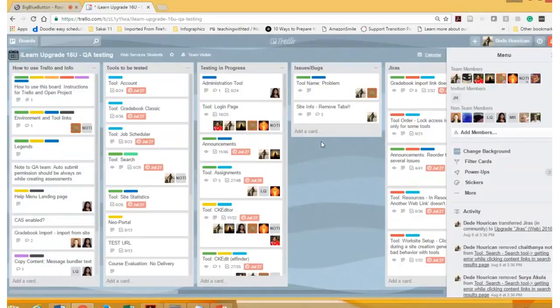That's used to keep track, because there's 3 major projects going on. The main reason for it is the calendar, so we can see deadlines and which student's working on what. If one person is on a red, 21, we don't expect to see them on anything else on that calendar until the end of the month. Can you show us what the calendar looks like?